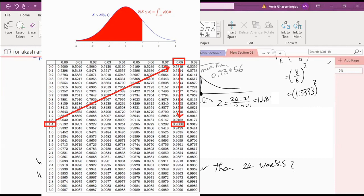A student asks about the Z-table on page 397: how to find 0.93056. You look at the first column for Z, search for 1.4, then go across the columns until the header reads 0.08 — because it's 1.48. That gives you the value.